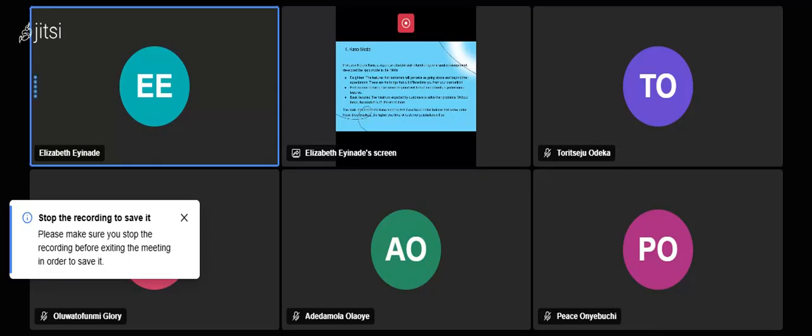Then we talked about the Kano model as well. The Kano model was introduced by a Japanese educator, an influential figure. So there we have the delighters, we have the performance feature, we have the basic feature. You start with the basic feature, then the performance feature, then the delighters. Delighters is when you go above and beyond the expectations of your customers.